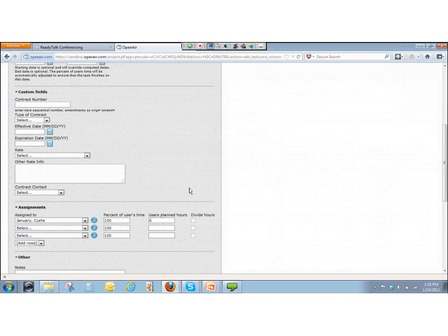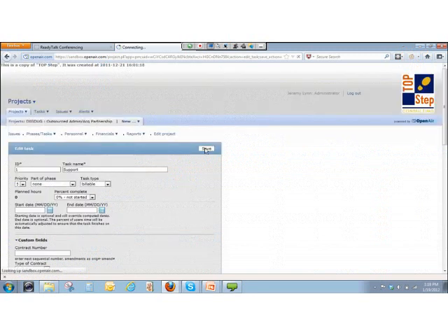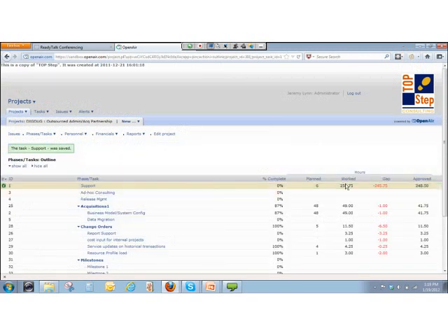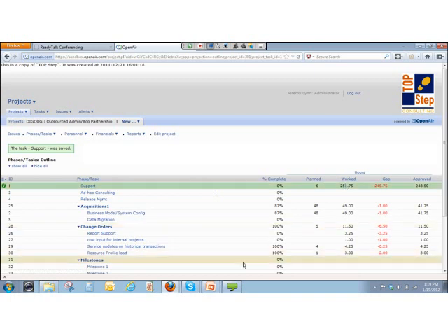Based on how they've entered time in the system, they have the ability to adjust the remaining hours, which impacts what's called estimated hours. Let's say Curtis was given a 6-hour budget on this task. He ended up working, wow, that's way over budget, 251, and he says, but I still need another 40. So he's adjusting his remaining hours, not to be negative, but to be a positive value of another 40 hours on his timesheet, which of course has a huge impact on percent complete.